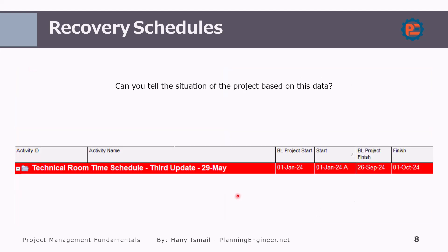From this photo, can you tell the situation of the project based on this data? We have here a project with a baseline project start, an actual start, a baseline project finish, and a forecast finish. From this snapshot, I can tell that the project planned to start 1st January 2024 and it has already started on 1st January 2024. The contractual finish date or baseline finish date is 26 September. However, the forecast finish date is 1st October.